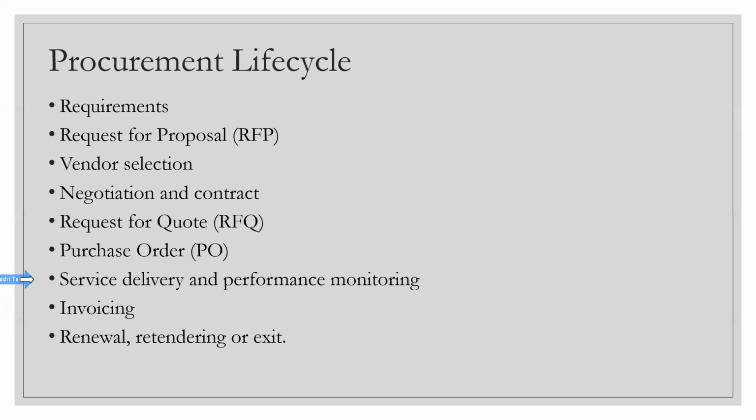Once the PO is generated, or prior to that, two things have to be confirmed from the vendor. Especially once you get the quote and your cost is determined, you also have to get the lead time. So let's say you are hiring a yellow badge contractor from a vendor. You have to know what the lead time is to get one yellow badge contractor. Is it tomorrow itself, or after 1 week, after 1 month? Similarly, for any kind of hardware, how long will it take for me to get the shipment of this particular model of switch to my doorstep in the company? So the vendor will be giving you some lead time, 6 weeks to 8 weeks, 8 weeks to 12 weeks, and so on and so forth, right?